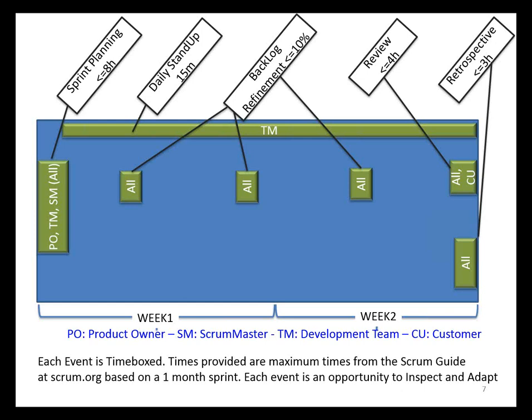Anyway, the things I want to point out here, the lessons learned, I'm going to take 3 of these events. One of them is backlog refinement. And I think one of the key things here is to have input from that test competency within the team to help review and refine those requirements in a preventative way like I talked about. That is your opportunity to prevent defects through the questioning, through the refinement, through the improvement of the acceptance criteria and so on. The other element of backlog refinement is estimation.